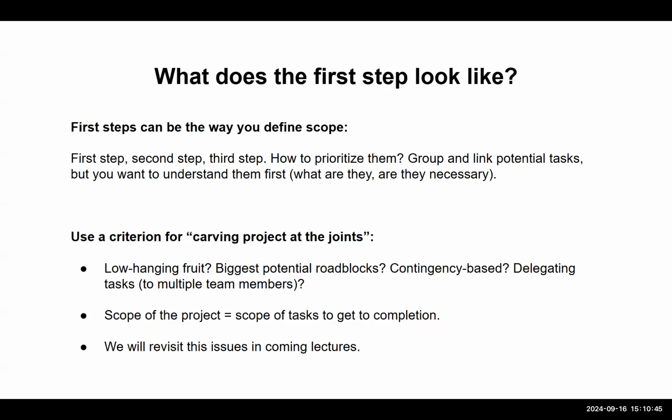So you might say, okay, I'm going to build 50 lines of code today, 50 lines of code tomorrow, 50 lines of code next week. By the end of week 2, I'll have 150 lines of code. Now, if programming worked like that, that would be great, but it doesn't really work that way. You have to write code, then you have to debug it, then you have to rewrite it, get people involved, make sure it works in a number of contexts, and make sure it works with other code. So you don't want to assume the steps are a certain way when that's not how it works.